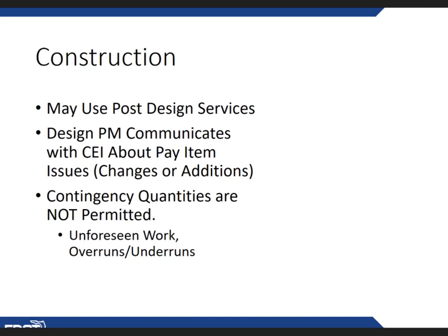The maximum payment thickness is defined in the specifications, but may not be shown in the plan set. We look at that as an adjustment based on the specifications basis of payment. It is not a contingency quantity. We've had cases where a designer wanted to put in extra concrete just in case. We never allow those contingency quantities because it violates our agreement with Federal Highway.